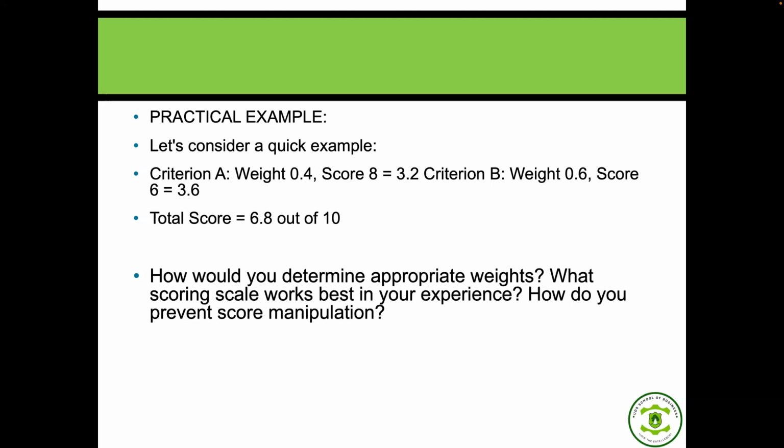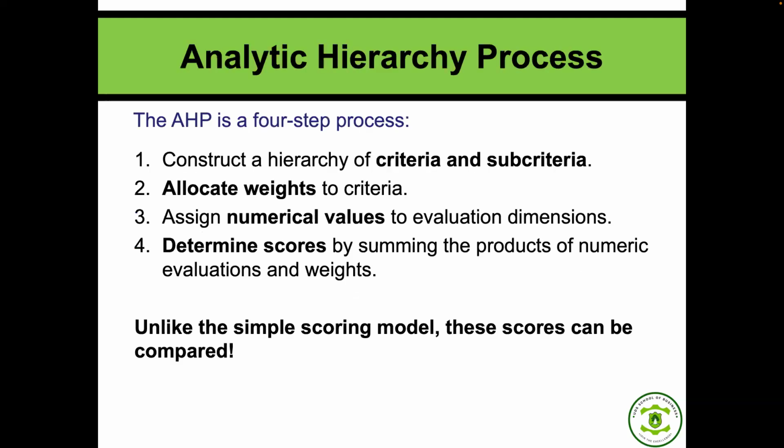Okay, yeah. So for riskier investments, more weight will be attached to the risk aspects. Assuming the organization is financially cash trapped, then more importance will be attached to what? Finance. Yes. It depends on the nature of the project.